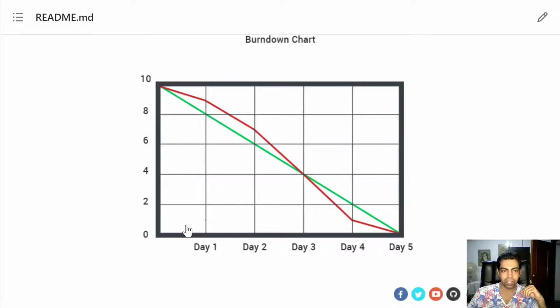At the end of each day in a sprint, a team member volunteers to calculate the remaining points and draw the actual speed of development line, the red line. And yes, finding the remaining points is an easy job if all of the developers move their own stories from column to column on the planning board, and I will explain the planning board later as we go on.